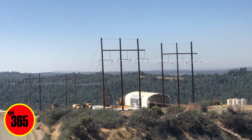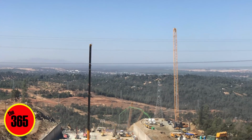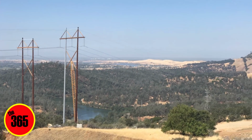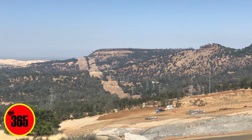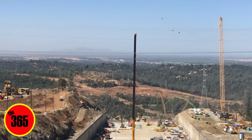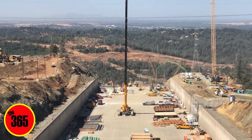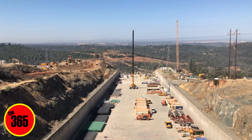The long-term fix is going to go over there on that far side of the mountain where they clear a lot of the trees and grub the mountainside. And it'll come down here back right about where your view is. It'll jump back across the diversion pool and then connect back to the old alignment and then carry out. So essentially just make a circle around the outflow of this chute. Yes, just bypass the whole area. We don't want to be connected to it anymore with power and water. Right. Same area.